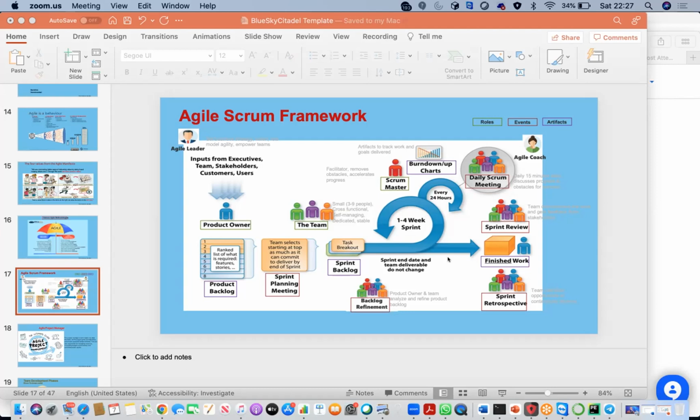They're falling behind. And that tool is meant to help you as a delivery manager to know that the way these people are going, it doesn't show that they would meet their commitment. And then you are able to quickly shout it out. So do you know the importance of the burn down chart now, right?